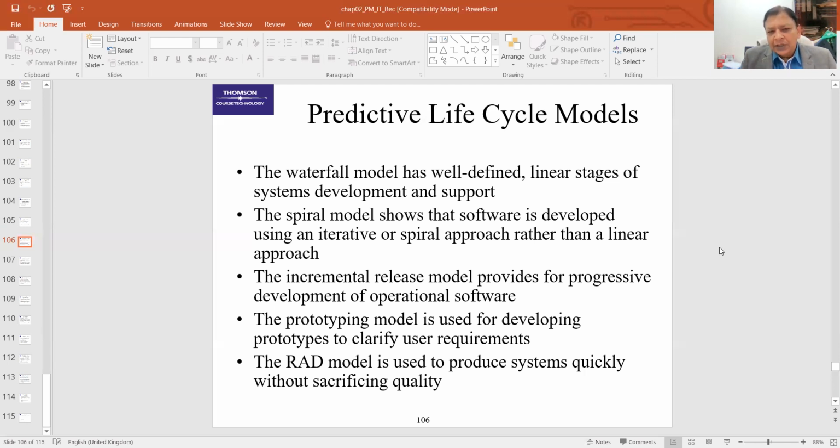For our first sub-cycle, when you do plan, you feel there is something required from the customer to communicate, to make it clear. So you do planning, you do communication again to improve your plan. So there is a chance of feedback. Instead, if you complete the cycle like the spiral model, and you need to make some changes, you have to wait for the second cycle. But in the Rational Unified Process, you have a chance to go back and rectify your mistakes.